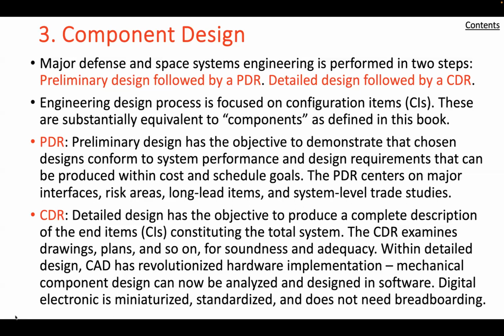For newly developed components, it is usually necessary to build prototypes and test them under simulated operating conditions to demonstrate that their engineering design is valid. These products of detailed design include draft production specifications. So sometimes there are letters associated with this one, so it would be C, D, and E specs.